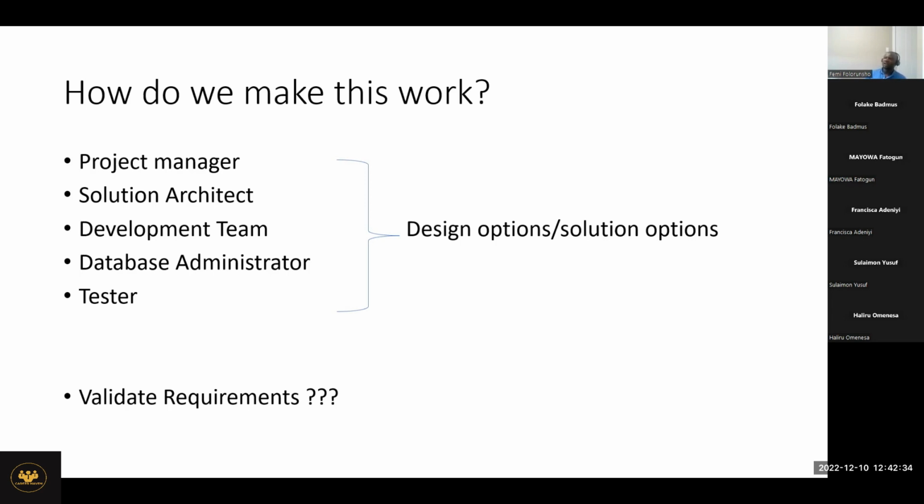We had an estimate of 4 months before, but based on the requirements, the developer will say, oh, for this leave approval application, they want to integrate our workflow management, maybe a CRM, and so on. From the requirements, the developer can say, I need 4 months on this because based on what I'm seeing on the ground, it's going to take me 4 months.